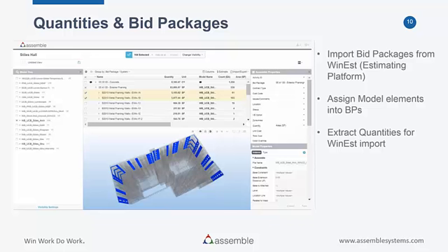Which types of the exterior metal framing actually belong there? So that's my big list of all the exterior wall types between 1A, 1B, 1C, 1D, with square footage for each of those types. At the same time, I'm making sure that I haven't missed anything yet. Making sure that I've included every single exterior wall type that is part of this project. Make sure that I don't have any holes in the exterior bid package.